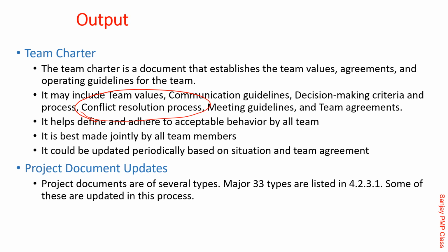Now here there are a few rules. They say, first thing, look at the issue or the problem, don't look at the personalities. You are not trying to find who is right or who is wrong. You are saying this is the decision, and which decision is right or wrong. Associating with the people would not be right. It is quite possible that in that process someone's side was right and someone else's side was wrong.